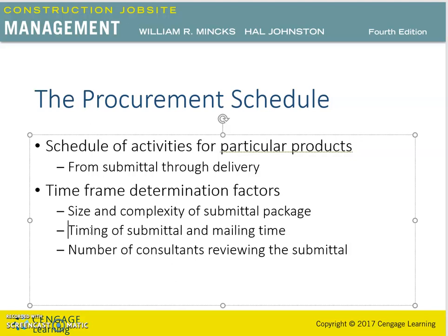If all of the project submittals are given to the architect on the same date, it would take considerable time to process the submittals. The number of consultants reviewing the submittal will influence the processing time. Occasionally, several consultants will review the submittal, which requires additional time for reviewing, handling, and mailing. And also, some of the architect's consultants may live in other geographical areas. Thus, mailing time should be considered in the approval process.